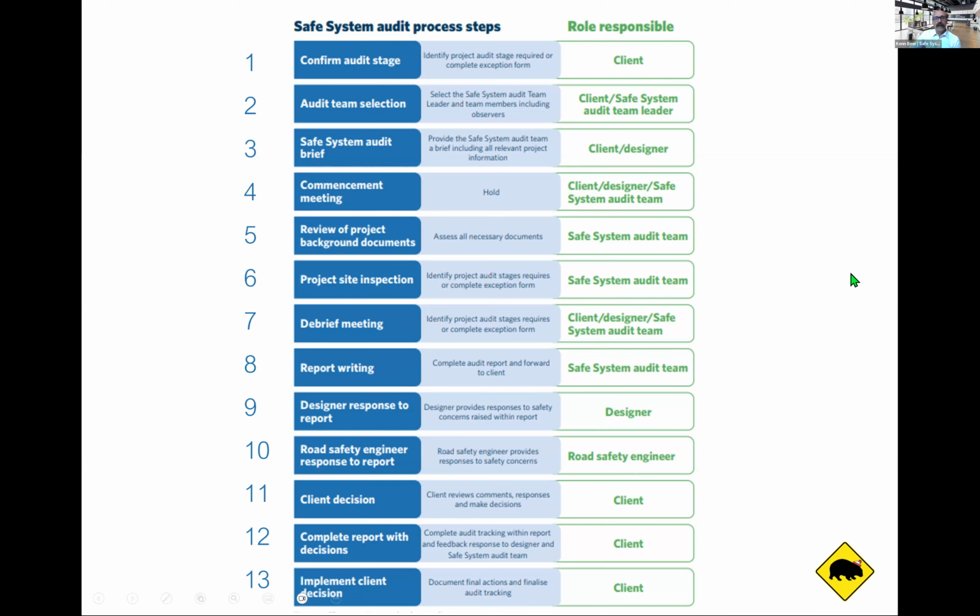Absolutely agree. Just document it out. And as you say, if it is a small council or something, yes, they might be the same person for a lot of these, and they can just fill that out. But you want to complete that, put it on your record, on file, have it there, closed out. I remember a lawyer once when I was in a road authority stressing the importance of that, saying to me, if we find that uncompleted, unfilled out, that's the smoking gun we're looking for from a legal perspective. So it's important to fill it out.